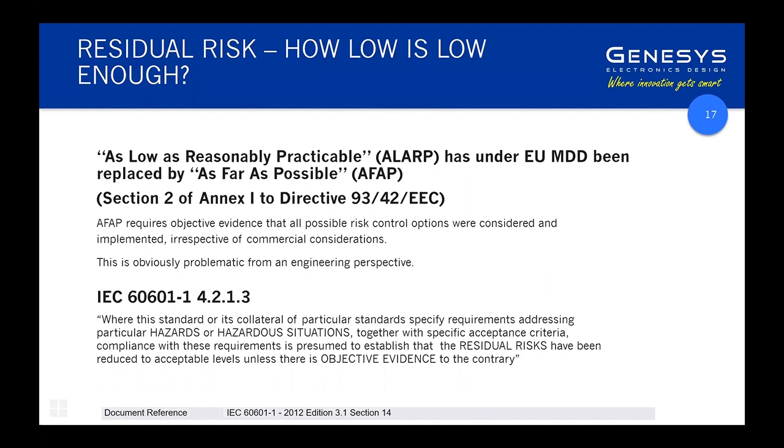I guess a comment I would make is make sure you don't use the term ALARP in your documents. You will get pinged on that in an audit. As far as possible, I think that what that means in practice is, can you think of any way that we can reduce this? And you get the risk further, you get to the point where you just can't think of anything else. And that's kind of, it feels, that's when you've got there. Do you know what I mean? You do as much as you can to reduce it as far as possible.